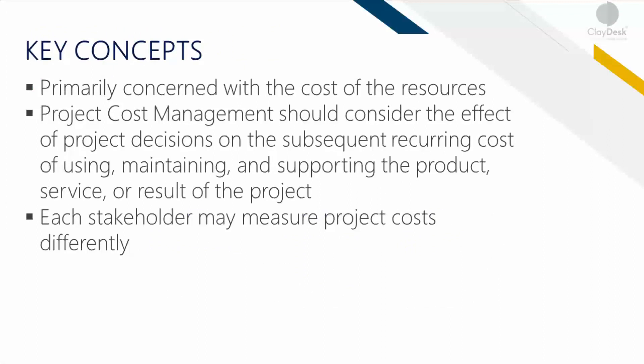Here are the key concepts regarding cost management. It's primarily concerned with the cost of the resources needed to complete project activities — for example, at what pay rate you hire vendors, what the cheapest vendor is you can find to do the job. If you need to hire extra office space, you need to consider all of the factors that relate to those costs. Project cost management should consider the effect of project decisions on recurring or subsequent costs of using, maintaining, and supporting whatever product or service you're working on.